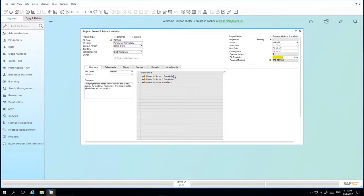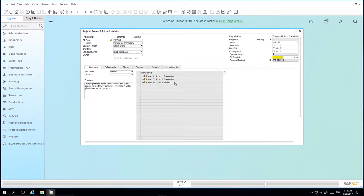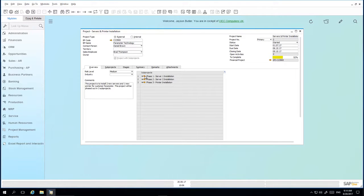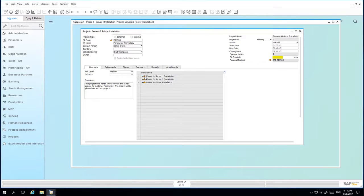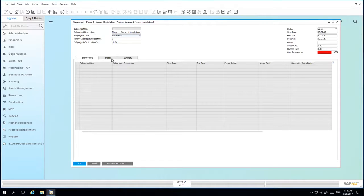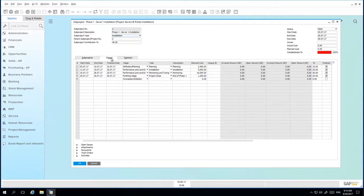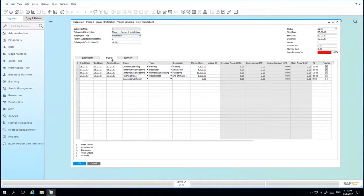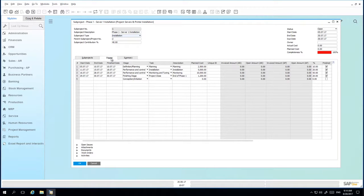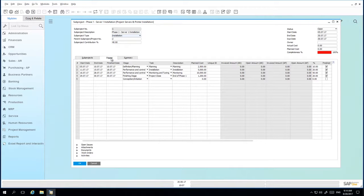You can see under the project window that under the sub-projects we have different phases of the project. We've got the Server 1 installation, Server 2 installation and then Phase 3 consists of the printer installation. If we drill down into the sub-projects, for phase 1 for example, and under the Stages tab, you can then view the stages in detail and any stage dependencies. Meaning you can define any dependencies across different sub-projects to ensure they are completed prior to moving on to the next stage.